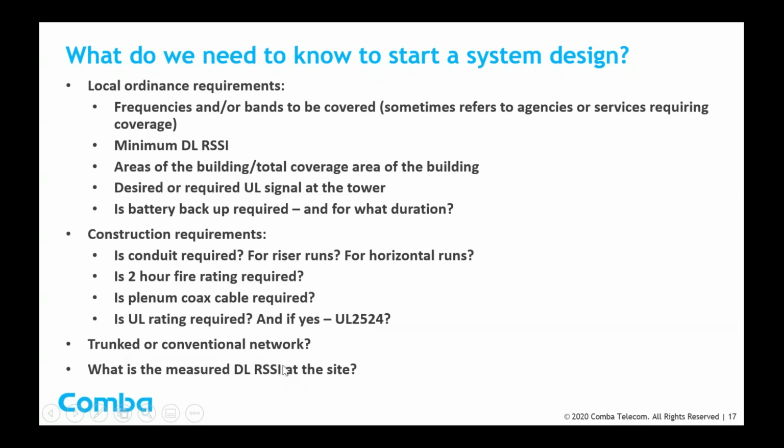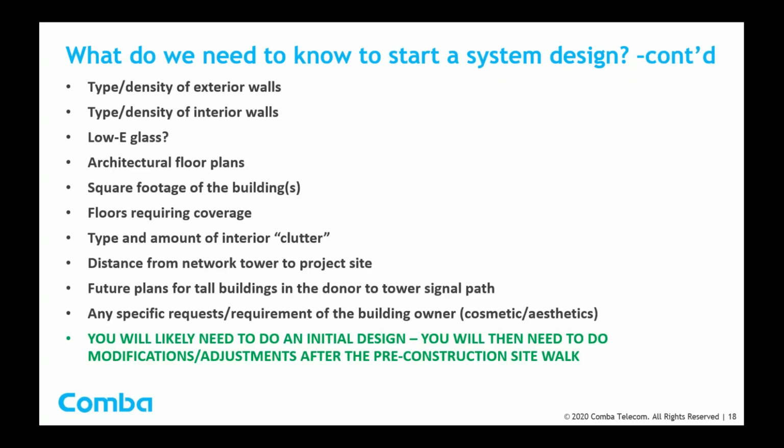Have you been able to go to the site once you know what the frequencies of bands are? Have you been able to go to the site with some test equipment and actually measure it? Because the designer needs to know that, because he needs to know how much signal he's going to get at the building to plot his downlink side of things. What else do you need to know?